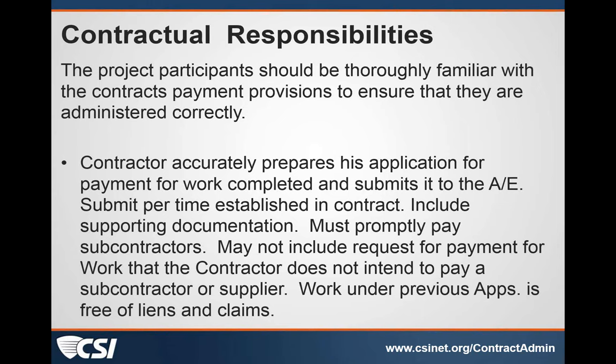Now, a little bit about paying the subcontractors promptly varies by state. North Carolina has a statute that requires the contractor to pay, and there is a certain time period within the statute that they have to comply with. And North Carolina also does not enforce pay-when-paid clauses in a contractor's contract. So you need to check your statutes. If you are putting that kind of language in your contracts or in your specifications, make sure that it's in sync with what the statutes of your state are.